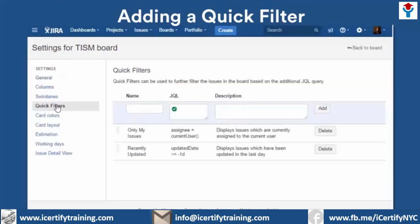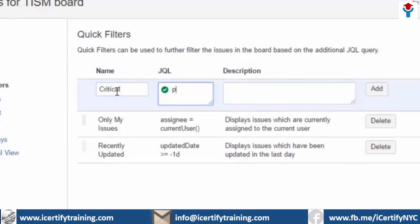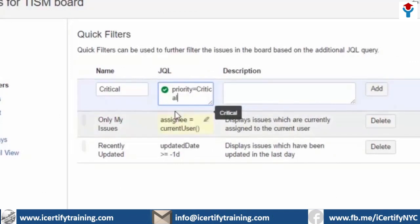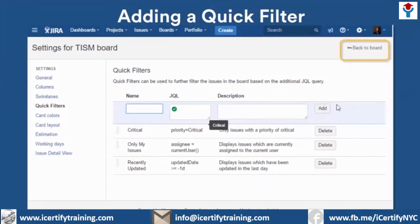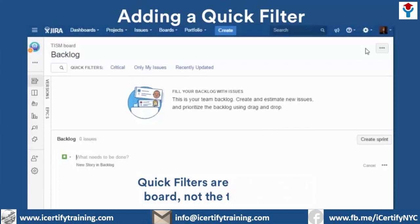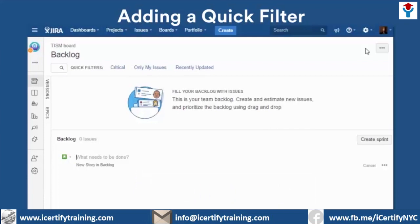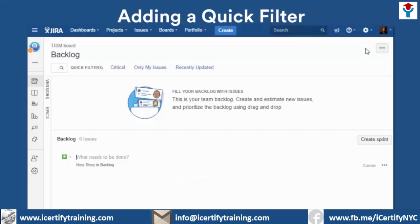Quick filters are set up using JQL. Before entering the JQL, give your quick filter a name. Let's start with an easy one — create a quick filter for all issues that have critical priority. We'll name the filter Critical. In the JQL edit box, enter: priority equals critical. Give your query a description, and then click Add to create your filter. Now you can view all critical issues and your teammates have access to this filter as well. Remember, quick filters are specific to the board, not the team member, so all of your teammates will be able to use them. Also keep in mind that quick filters need issues to filter. When you first create your project, there are no issues, so running a quick filter won't return any. As your project fills with issues, the quick filters will be able to do their magic.